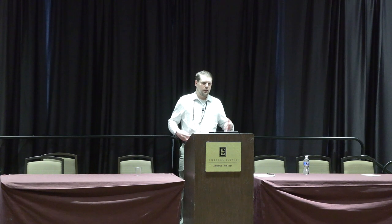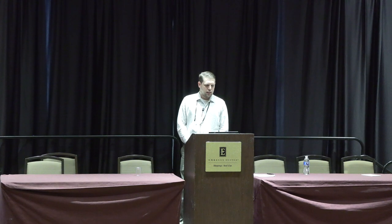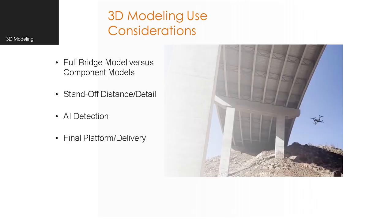My next slides go over how we've implemented 3D modeling. The drawback before we get into it is the post-processing time. When determining whether you need video or 3D modeling, consider what you're looking for in the scope of work. Within 3D models, we have full bridge models versus component models. Standoff distance and detail matter — how close does the drone need to be to get the detail needed? We're also experimenting with AI crack detection, which requires ensuring your standoff distance captures sufficient detail. And how are we delivering this to the client?